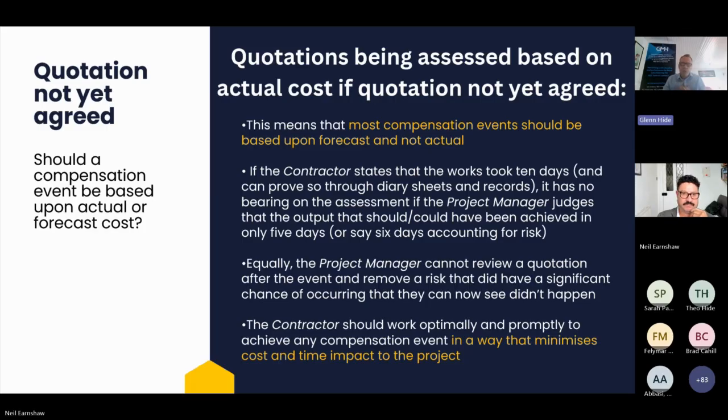However, the important thing about that is it has not set a precedent to say, oh yeah, if it goes to court, it's going to be actual cost. In that case, there were lots of Z clause amendments. In that case, neither party administered things. So the judge was kind of, well, what else can I do in this situation? So that's why it went down that road. Really importantly, it doesn't mean that, oh yeah, if it goes to court, that set a legal precedent, it's going to go that way. So great comment, Gareth, but it doesn't change the rule.